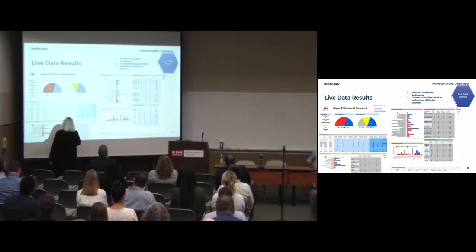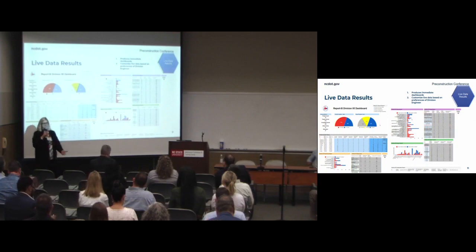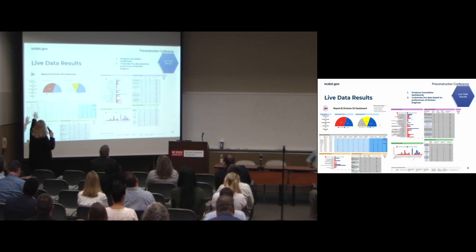So that sheet that is being directly inputted out in the field for every status of a right-of-way milestone, initial contact, appraisal request, offer made, appraisal received, relocation, settlement, closing, all those things generate this dashboard here. And what this does, it gives you a total and complete look at all the information, all the right-of-way that's going on in one division.